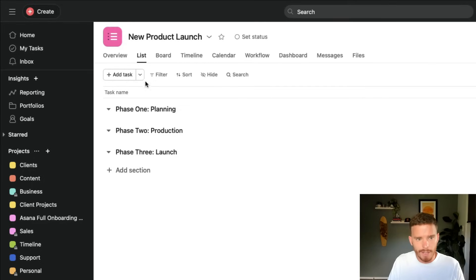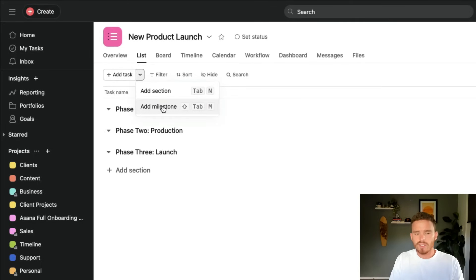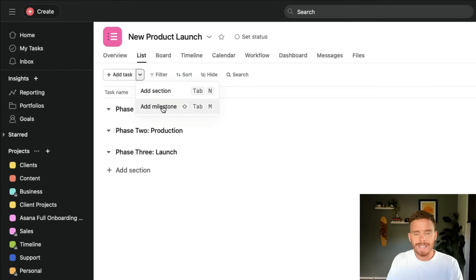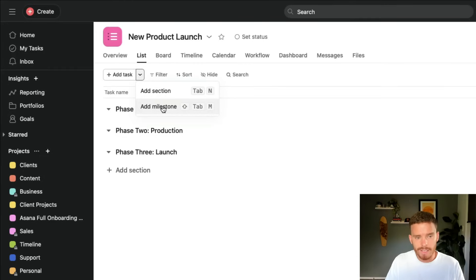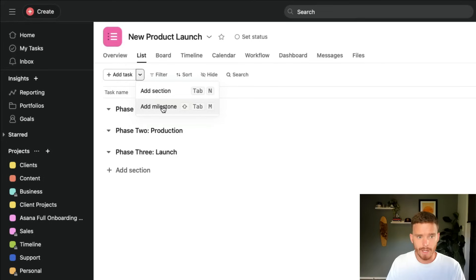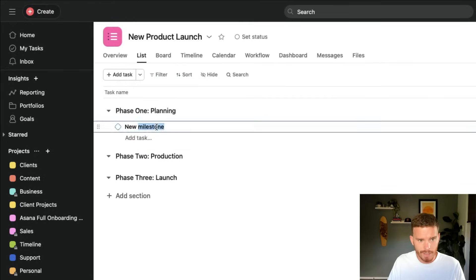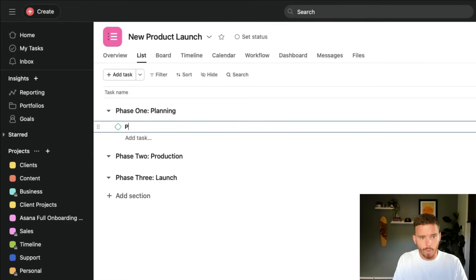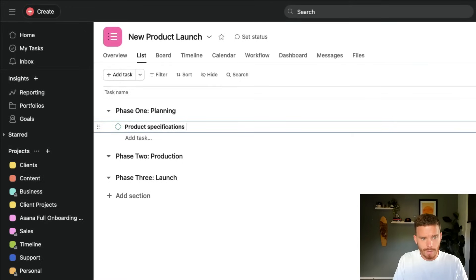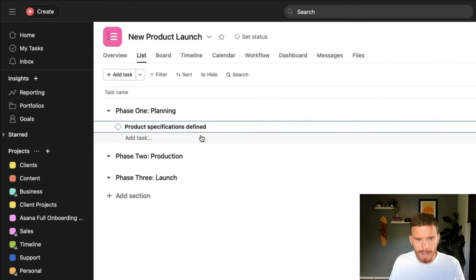Once I have my sections ready to go, I would then create some milestones. Milestones are sort of like tasks, but they are the more significant, important tasks. Think of them as like the deliverables or major due dates within a project. So I'm going to have a milestone, let's put this into the planning section. So we might have a milestone for product specifications defined. That would be a major milestone is working out the specs of the product.